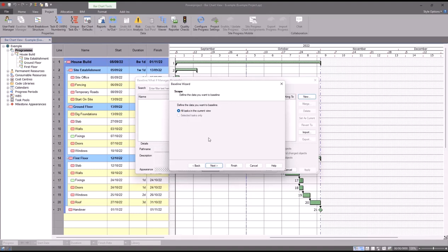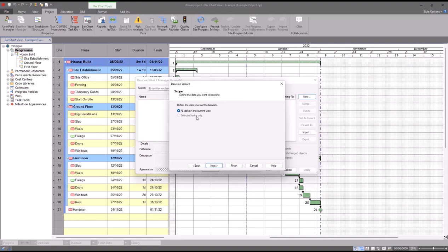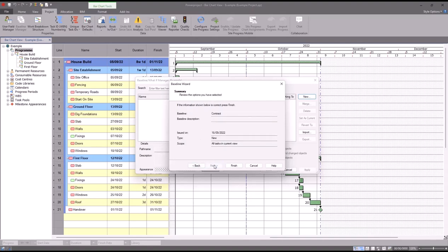On this next screen, I'm going to set it to all tasks in the current view. If I'd selected a handful of tasks, so it might be for example that I've retrospectively added some activities into my project, I could select them and I could highlight this bottom option here. But in this case I'm just going to baseline everything in my view.